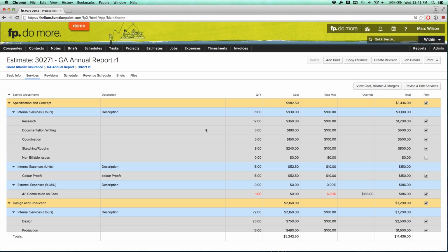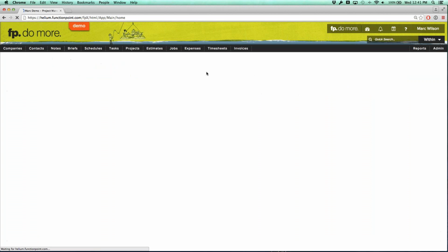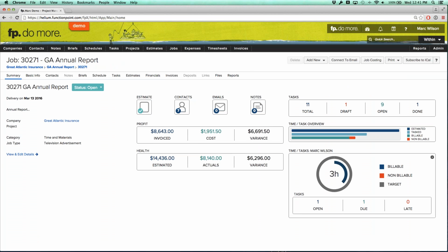Another way to do it would be to track to the existing structure and then bill time and materials moving forward. So you bill 50% up front, and then the client says, "Hey, we need all this work done," and you say, "Okay, based on your requests, I can't bill you the remaining 50%. It's not going to cover it. So from here on out, I'm just going to bill you hourly." And then you just switch halfway through. When you switch halfway through, you're going to want to adjust the job category to reflect that, so that when you're running reports on what job categories you still have open, it is reflected in those lists.